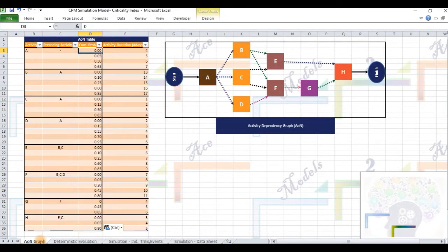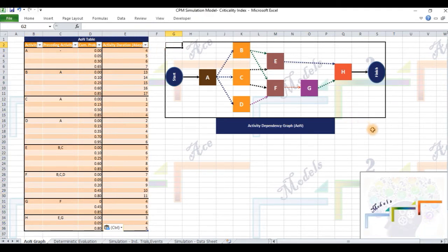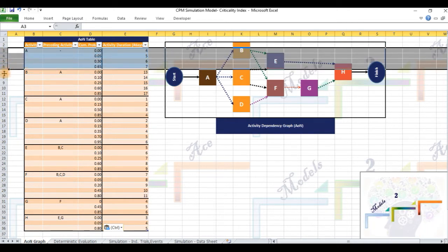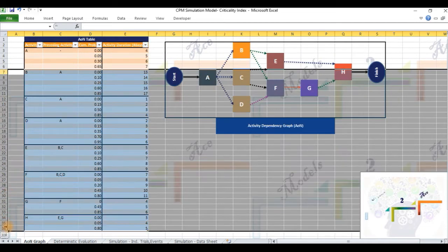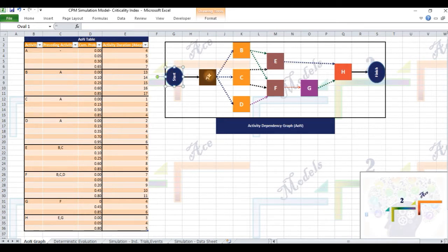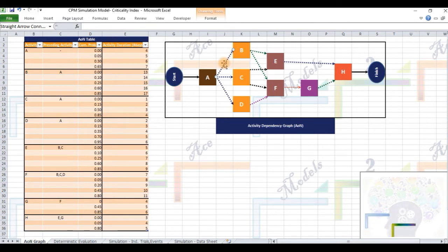The table named AON table lists out eight activities in the project named A through H in the first column. Data regarding activity on node A in the graph is available in the table, rows three to six. Similarly for activities B, C, D, E, F, G, H. Two dummy nodes labeled start and end are inserted to indicate the terminal extremes of the network of nodes. Start indicates day zero. Activity A being the first activity has no predecessor. Activity B is preceded by A and can start only after A has completed. This dependency is visually depicted by the directed arrow originating from node A and terminating on node B.